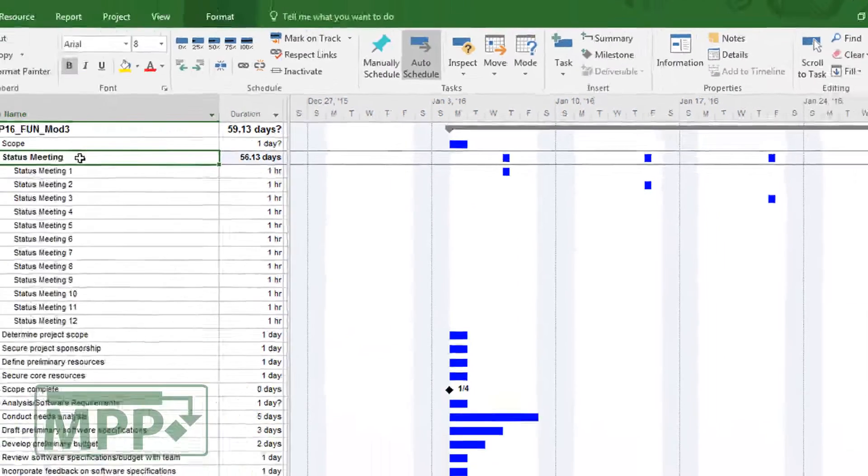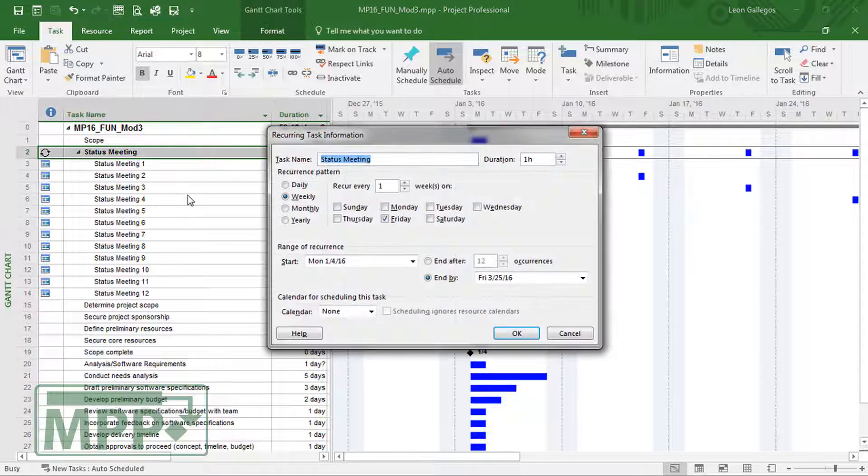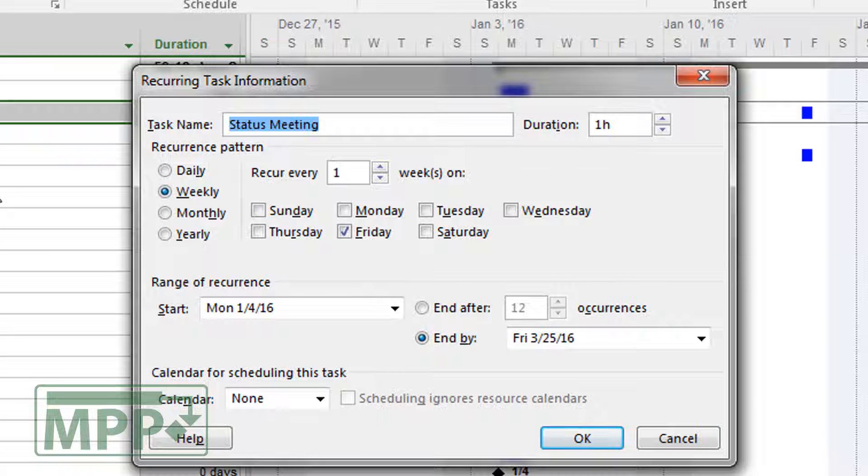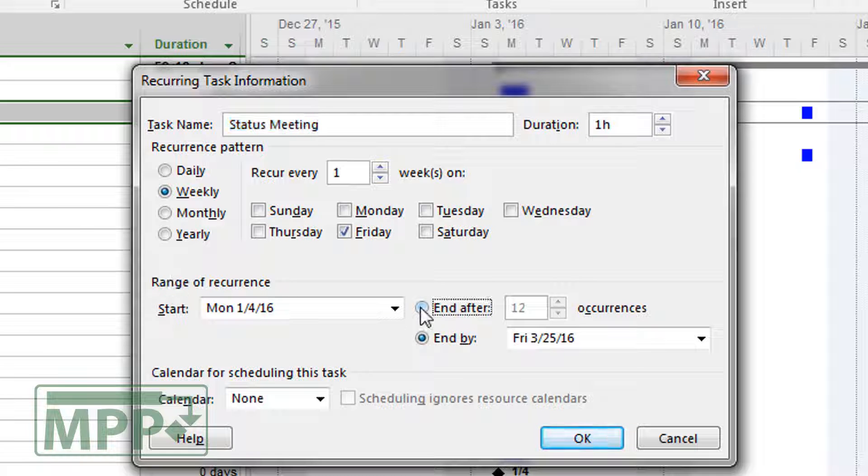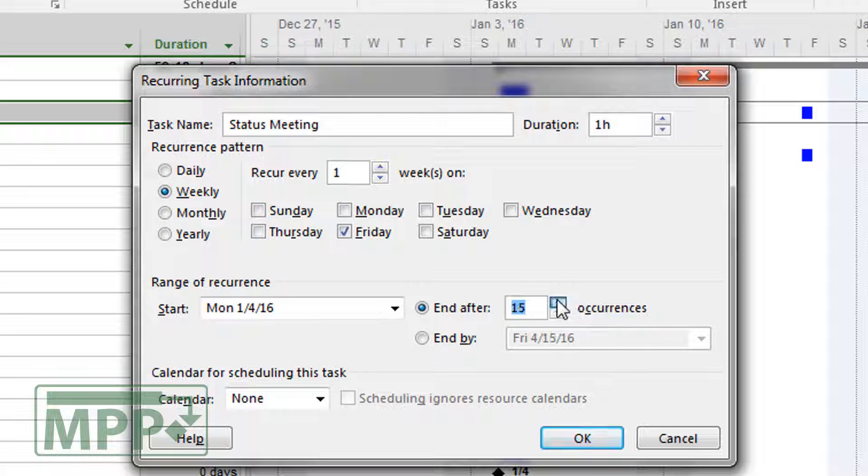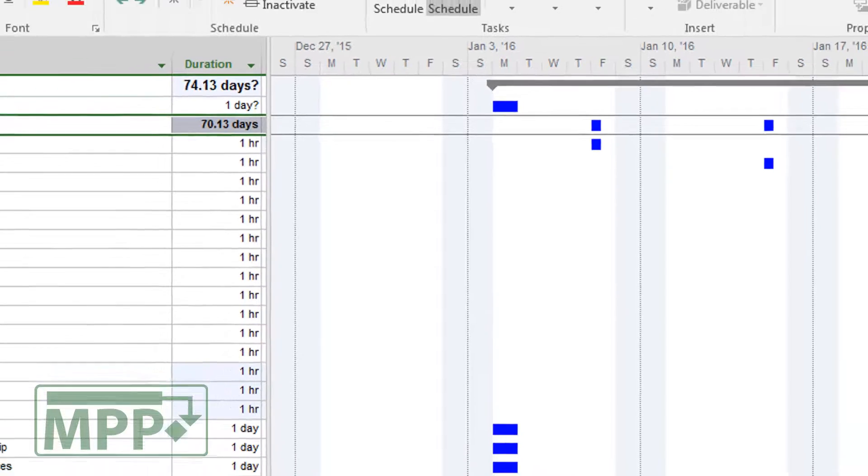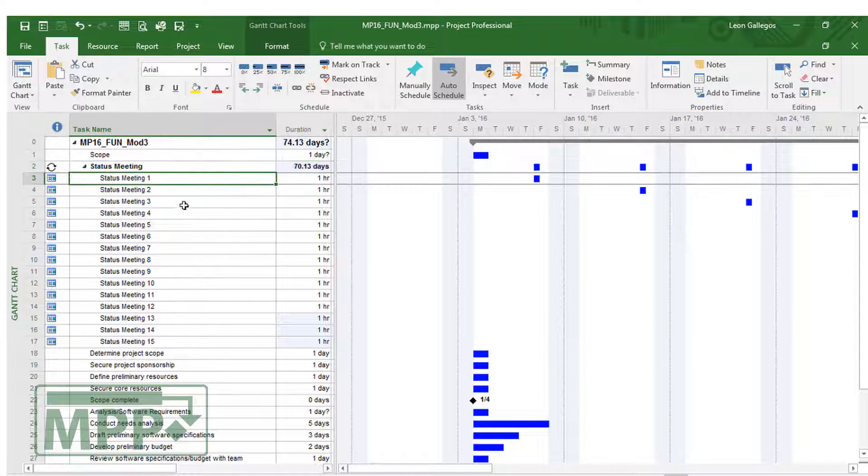Now I'm going to double click on the status meeting itself because I was telling you that you can go in and adjust the recurring task information easily. This is how we do it by just simply double clicking. You can get back into the recurring task information and tell it, you know what, I don't think it's going to be 12 instances. I think it's going to be more than that. So I'm going to change it to end after 15 occurrences. And then it just adds those individual items.